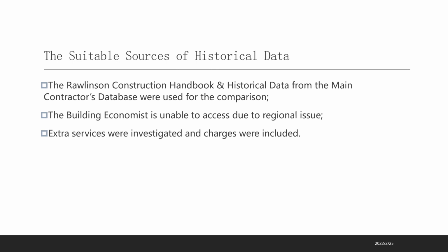Due to the local regulations, an extra cost of getting approval for knocking down some of the non-load-bearing walls was added to the special service role with a rate referred from the local cost handbook. This was fundamental to the interior design and was brought up during the meeting.